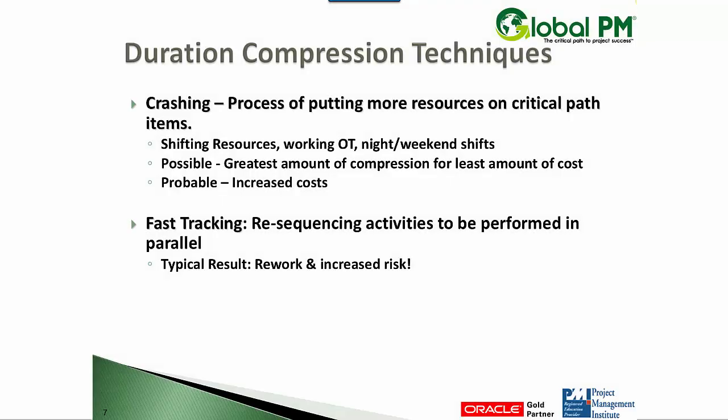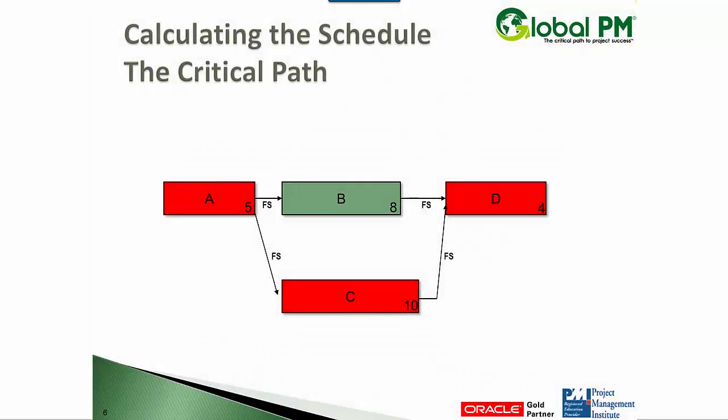If the previous slide was what we were shooting for, it was day 19, and we needed to compress this schedule. How could we go about doing that? Most people say you can either add manpower or man hours. That's true. I could look at adding more manpower to these critical activities. I could look at increasing the work hours on the resources of these critical activities. I might also look at shifting resources from B to C, for example.